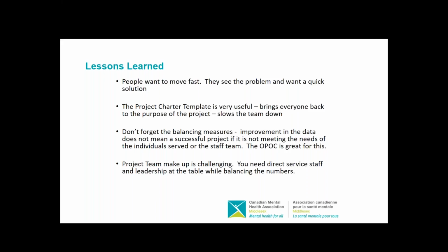So some of the lessons learned as we're moving through both the quality improvement project as well as implementing the OPOC is that people do want to move fast. In this agency, they see a problem and they come up with a solution immediately. But moving fast doesn't allow time to really assess what the root cause is. And so when you use the tools that E-QIP provides, the 5 Whys, the fishbone, the charter, it takes time to complete those exercises, and it leads to more effective change ideas because you're not just jumping the gun and coming up with a solution without really taking the time to think about it.